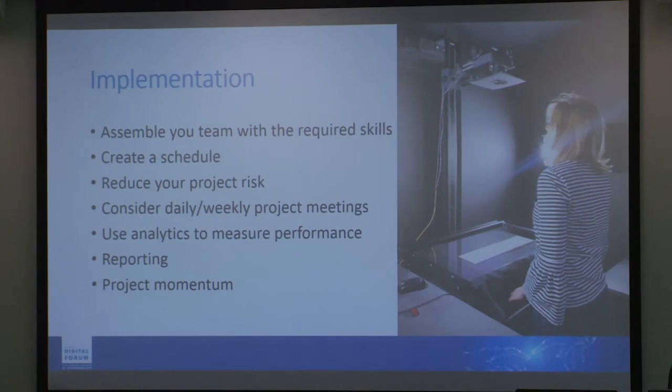More importantly, identify any risks and issues. Do that at the outset, and that way there won't be a surprise as you go through the project. Review the time frame. I've done that. Items with conservation requirements are often a delay factor: things you've scheduled to digitise actually have to go through quite a process to be conserved before they get captured.